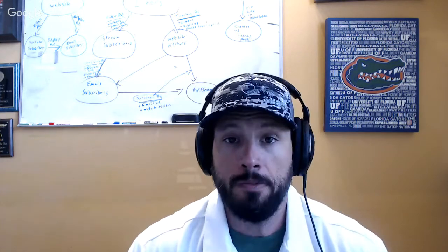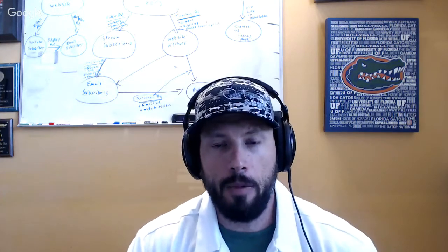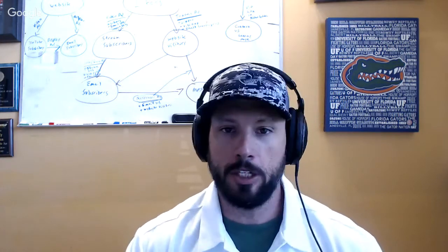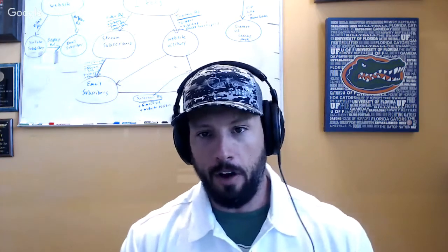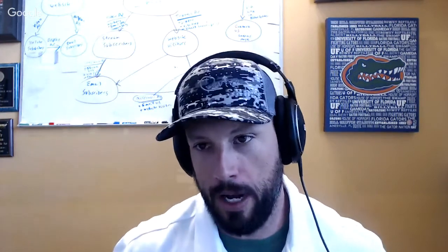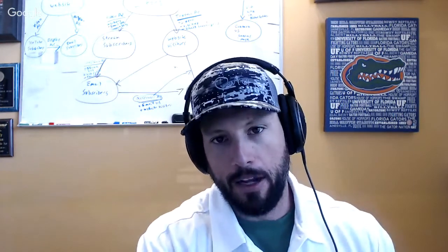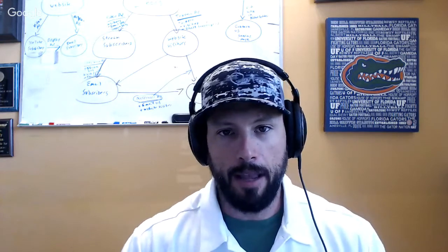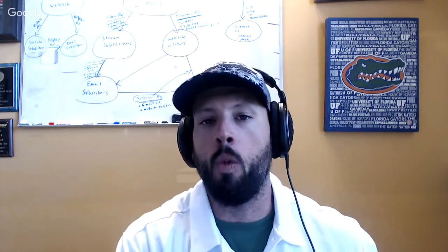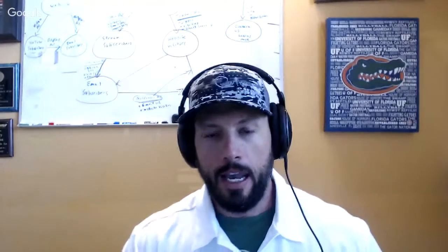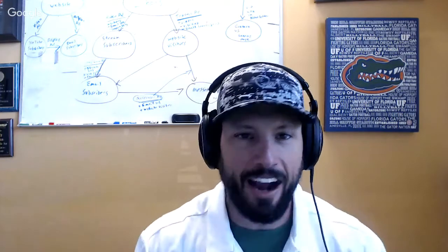What we do at the beginning of a project, and here's another buzzword for you, is called a research sprint. It's part of agile development. Let me take one more step back. A sprint is usually a defined period of time. In our realm, usually it's 1 week. Exactly, 1 or 2 weeks is the general length of an iteration. Sprint is synonymous with an iteration, basically. That's right. Iteration is another word you'll hear thrown around a ton with agile methodologies. Yep. So basically you take 1 week and you research the heck out of everything you have.